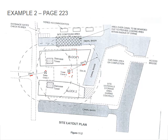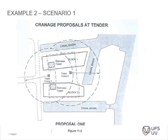Once the basement is done, one crane can be removed and only one left. The two cranes are needed because access is limited for one crane — it doesn't reach everywhere. That is one of the key considerations: access to site and to where the crane can actually reach.